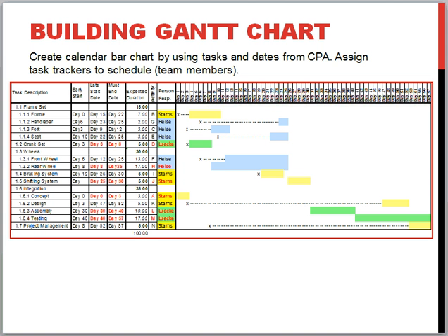Now, you'll notice here, interestingly enough, that one of the individuals in this task list, whose last name happens to be Heisey, has a number of tasks that are all happening in parallel at the same time. Now, this, under normal circumstances, would be a problem or would cause that person to have to put excessive time in a given period, such as a day or a week, in order to get all of the tasks accomplished under normal plans. So we're going to do a little load leveling here.